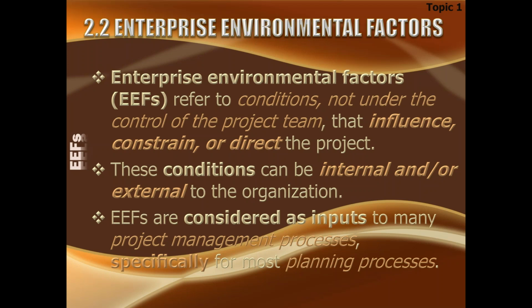So these are from both sides. Maybe I have all the policies, I have the format or template of the charter, but I need more help. I need to see the experience of a previous project manager. So I may dive into the repository and find a similar project and try to look at the charter of that project and seek help from there. So this I am now getting from the repository also. So I can seek help from anywhere in the organizational process assets or enterprise environmental factors. So EEFs are considered as input, as I said.